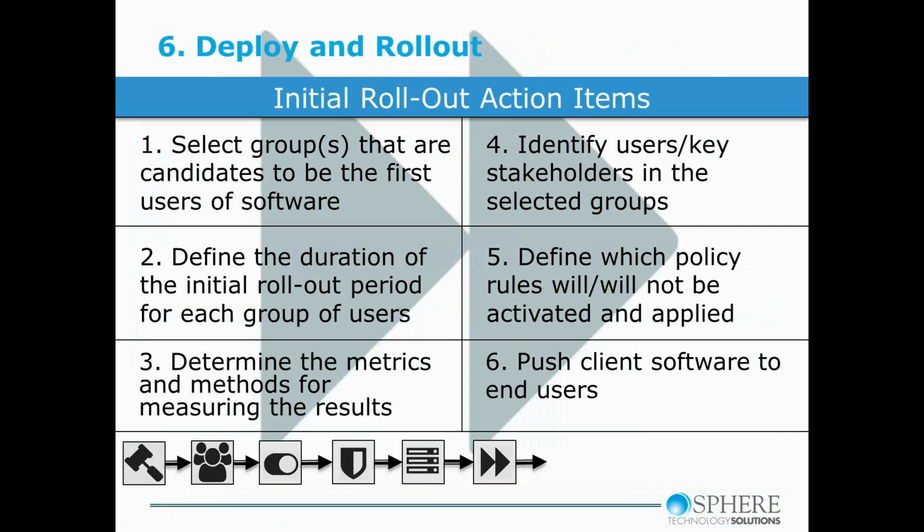So my big recommendation here would be to have a stopwatch. Let people give you feedback, and tons of it, but prioritize it and come up with a top 10 list like we've done here today of things that will help the bigger project, and also things that you logically and logistically can accomplish in a reasonable amount of time.